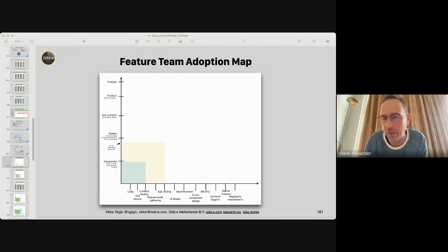And they thought that was what definition of done should be about. So they confused these two things. You could view it as a checklist to say, well, have we looked to see whether UI design is important or not for this? But they were seeing it more as, well, in our Tayloristic way of doing it, we would always have the UI design people be handed the work to do. Therefore, when we work in a more cross-functional way, we're going to have to make sure that UI design has been done as a distinct slot of time and Jira ticket and all the rest of it.